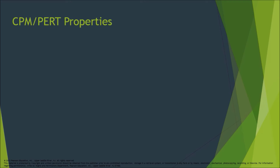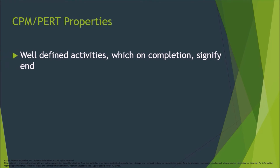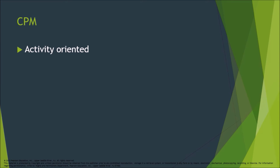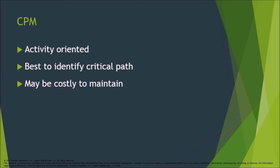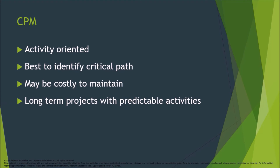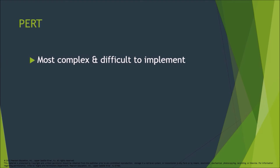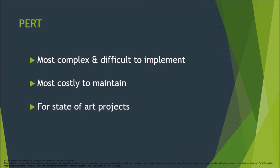CPM and PERT properties include well-defined activities which on completion signify the end, and activities that may be started and stopped independently of each other within a given sequence. CPM is activity-oriented, best to identify the critical path, may be costly to maintain, and is suited to long-term projects with predictable activities or projects with scarce resources. PERT is the most complex and difficult to implement, most costly to maintain, and is used for state-of-the-art projects.